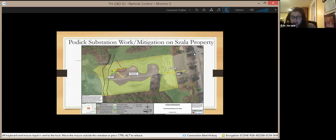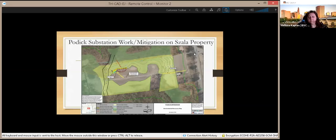Yeah, I mean, I think just from that standpoint, and we can talk more offline about this, but I think the town's definitely going to want to be in the loop as far as what's being proposed with the dam removal itself, just because we would like to do it in an incremental way. And I know they may need to do it in a specific way in order to target the beavers, but the town would definitely like to do it in a slow letdown fashion, as opposed to just ripping it out and having it flood downstream or something. Well, absolutely. Yeah, I think they acknowledge that. And as Jonathan mentioned, you'd have to breach it first and let it slowly go down, and then you can manage it from there, how much further you go and how fast you go. Mm-hmm.